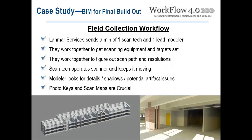While the scan tech keeps the scanner moving — because time on site is precious — the modeler should be looking for details, shadows, and potential artifact issues. If they need to do BOMA calculations and are measuring to the window, scanners have difficulty picking up glass, so the modeler should pay particular attention to how the window is put together and where the glass plane actually is. At the end of the day, photo keys and scan maps are crucial. Right before leaving the site, if you stop and draw out where all your photos and scans were taken, there's a good chance you'll see something you might have missed rather than discovering it back at the office.